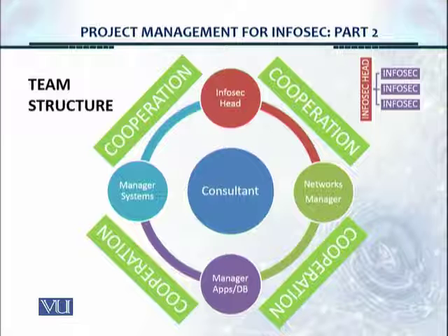And one of the ways is to create an annual appraisal based on the success of the information security transformation in 12 months. All of these team members, their 1-year appraisal should be linked 25 to 30% on this project. And that is a sign-off we get from the CIO or from the upper management.